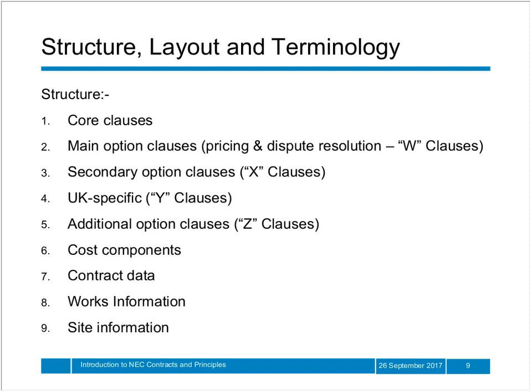So the employer would prepare a list of items and quantities in the usual way, and the contractor would price those. The contractor is then paid following the actual measurement of the quantities of those items carried out. Now in contrast, options C and D are target contracts with either an activity schedule or a bill of quantities, and these are effectively a cost-plus contract, with the intention being that the employer and contractor share the financial risk